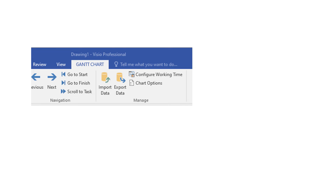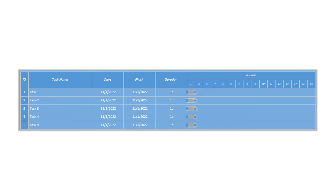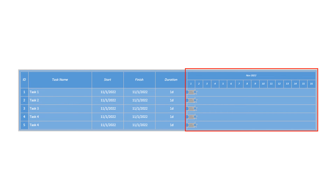If you want to specify Saturdays and Sundays as working days, you can do so by going to Gantt chart in the menu bar and selecting Configure Working Time. Then put a check on Sunday and Saturday to make them working days and click OK. As you can notice, the white columns on the Gantt chart section have been removed.